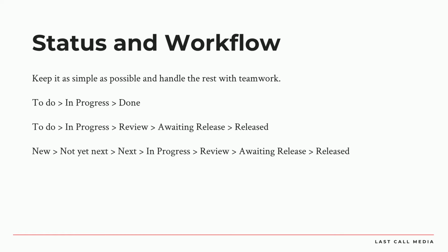Those are pretty code specific, so that's going to be different needs than if you're a content team and you have a draft, approval, publishing workflow. Your issues aren't going to make sense ending up as awaiting merge. Well, I mean, you could make it make sense, but you're doing two different things. So that might be a case where multiple projects is going to make more sense, for maybe the web development team and the content team that's creating the content.